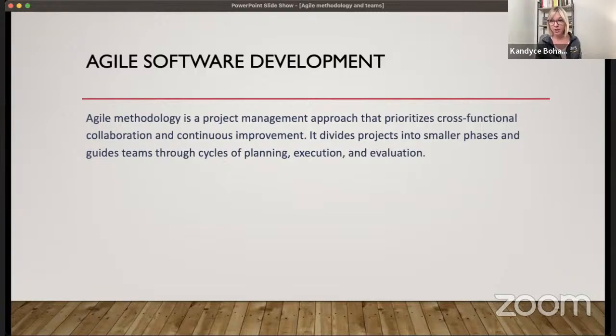We are talking about project management and how we are going to organize and deliver this project. What we want to do is create teams that are cross-functional. So we want to have all of those roles that I mentioned on the previous slide all on a single team. Prior to agile development, they were often split based on your role, so you would have a QA team and a software engineering team. Agile development says, let's bring all of those people together.